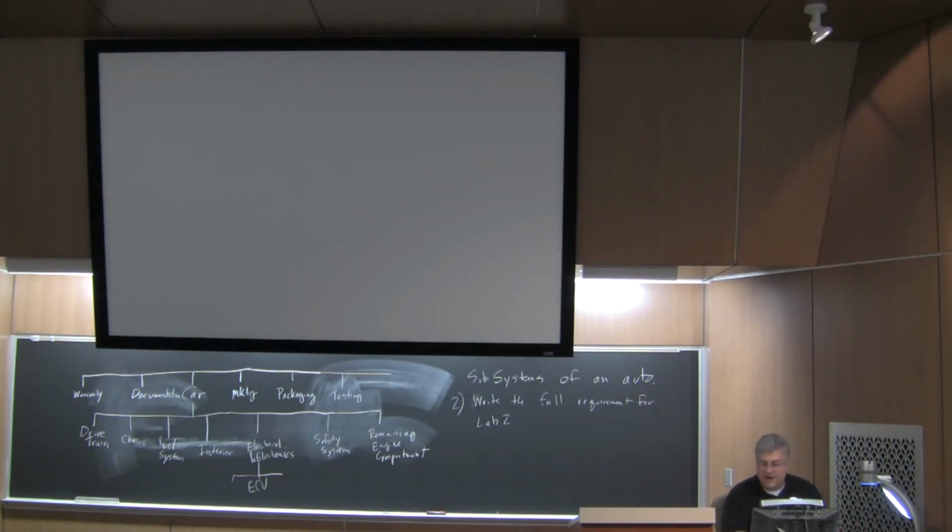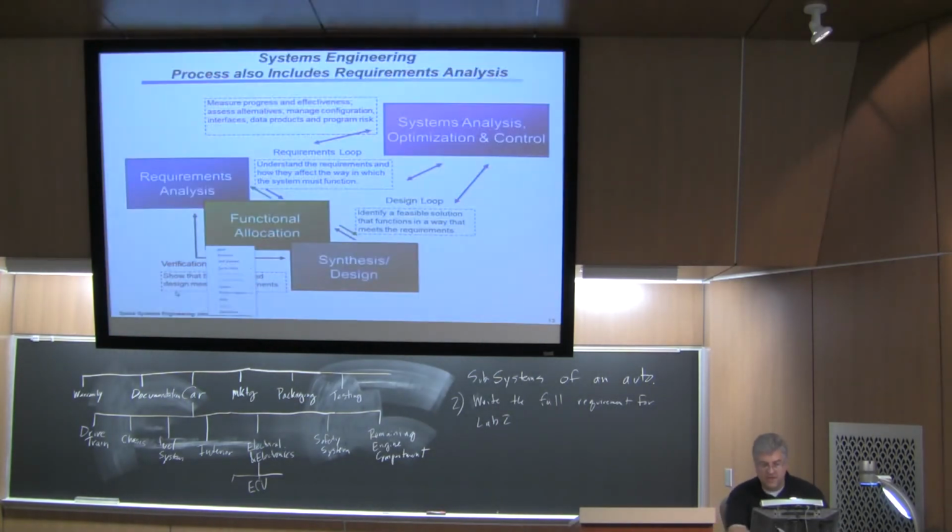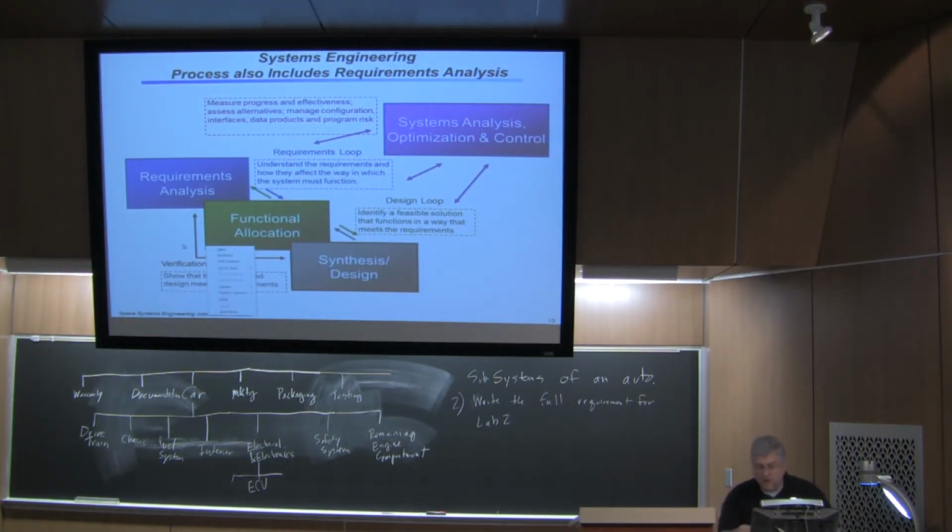So once we have identified our requirements, would you put the power source under the electrical? And that's all a matter of what you want to do. I mean, you may put it under a power subsystem altogether. And the power subsystem would be battery, safety circuit, charging circuit, all together, versus the electrical or electronic control system. There's many ways to organize any project, but the whole point is organize it, and then decompose it.